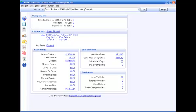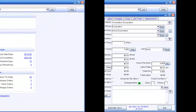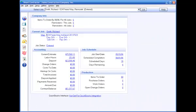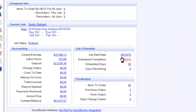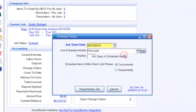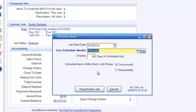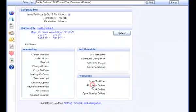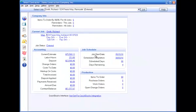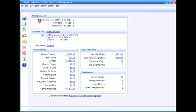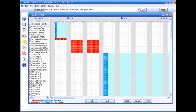Smart Contractor automatically generates the job schedule from data in your job estimate. All you have to do is enter the job start date and click Reschedule Job. Then go to Edit Schedule and there's your job schedule.